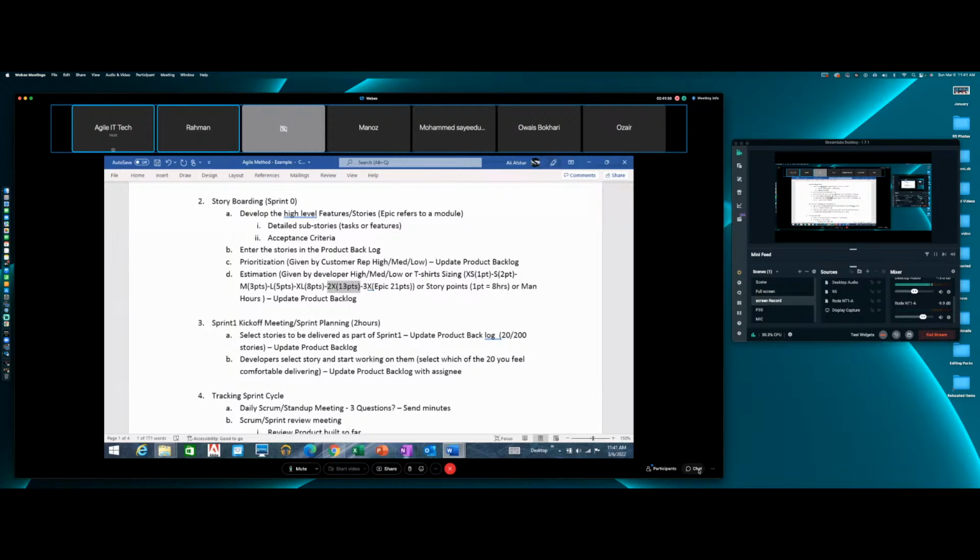Another guy can do the piece of encrypting the user ID and the password. Another guy could build the error message in the event the user ID and the password fail. Another guy could work on retrieving the data from the database in the event the user ID and password are good, so that they can load the account summary page. You can divide that task into subtasks.